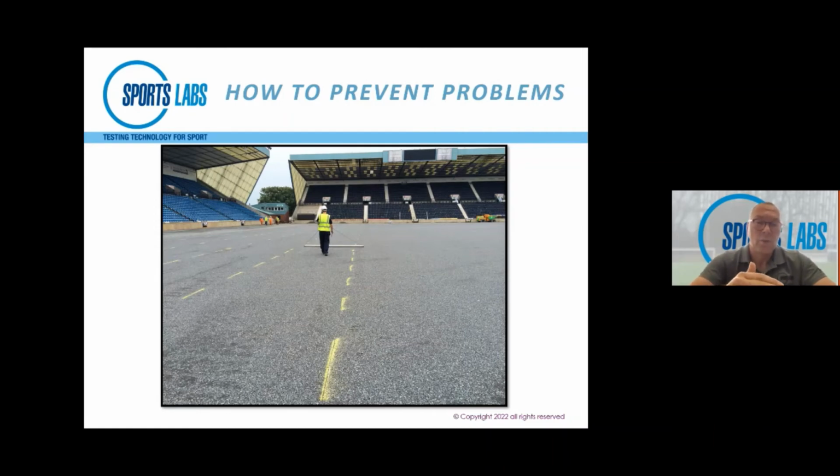The main contractor wants confidence that what they're going to lay the artificial turf on is to standard. So we'll get put in the middle of that relationship, and then we'll be asked to sign off the sub-base, so that when it's handed over to the main contractor to lay the artificial turf, there's a certificate in place.